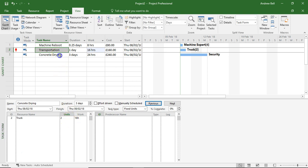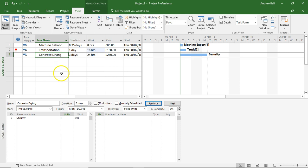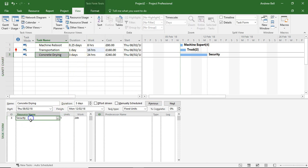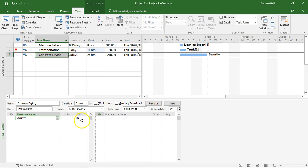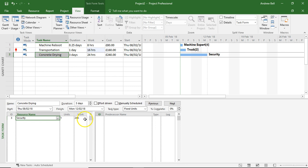Now let's have a look at our concrete drying task. We said we need three days for this concrete to dry and we don't want anybody to walk on it. Interestingly, I've got a security man here and because it's a three-day task, he's assigned 24 hours of work. So he's only going to monitor this during working hours, which means that technically people could walk on my concrete overnight or early in the morning before security get there.